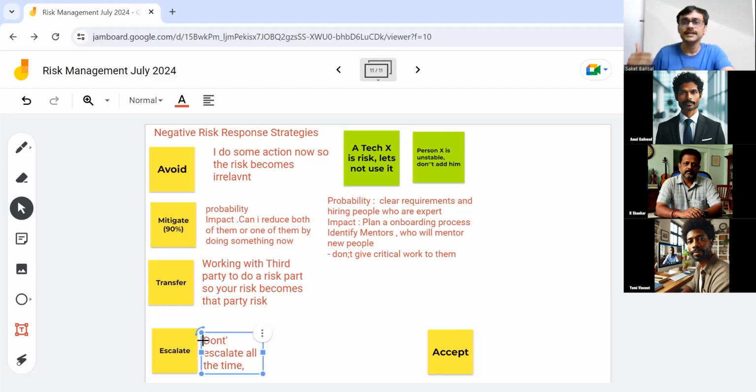But management also wants to take their options when things are going beyond a level. So I agree on those triggers in my risk management plan, and whenever I breach those triggers, I escalate. As you saw in the risk management plan, we spoke about risk response strategies. We briefed them and also gave an example. That document will be with you, on when you should apply which strategy. So there we should have an agreement about escalation also.